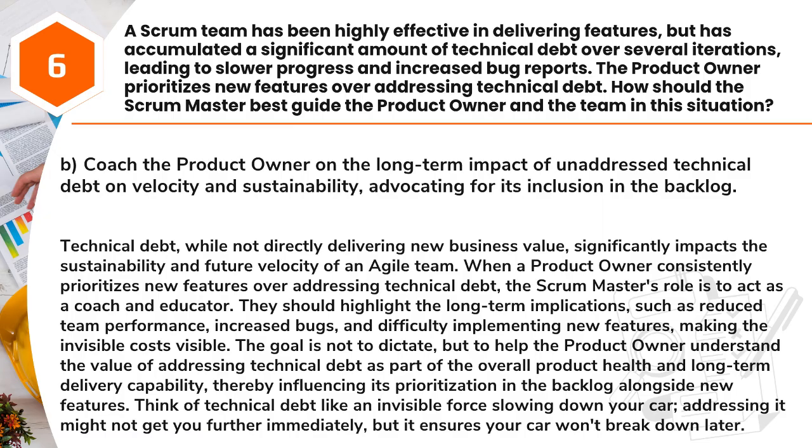Technical debt, while not directly delivering new business value, significantly impacts the sustainability and future velocity of an agile team. When a product owner consistently prioritizes new features over addressing technical debt, the Scrum Master's role is to act as a coach and educator. They should highlight the long-term implications, such as reduced team performance, increased bugs, and difficulty implementing new features, making the invisible costs visible.